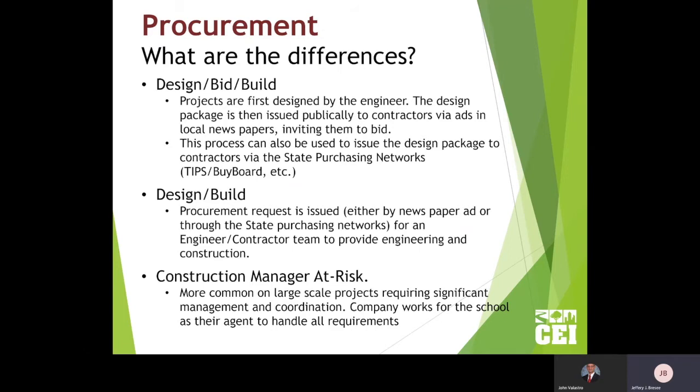Typically in this, the efficiency is that there's not so much of the full documentation, you might say. Specs are typically not done under this, although they can be. A lot of times, a lot of the requirements are just incorporated into the set of drawings. And in that way, you have at least the drawings to guide the project.